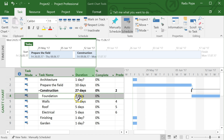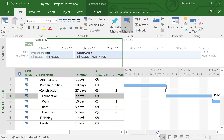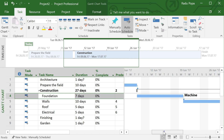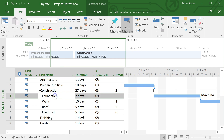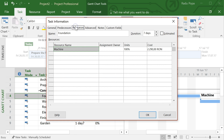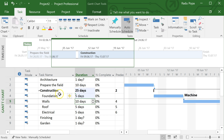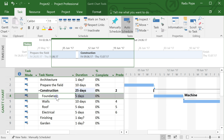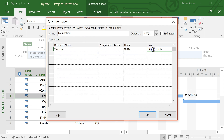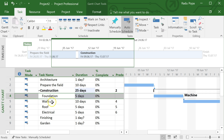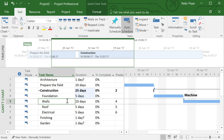Assigning the machine resource will calculate its cost over seven days — the duration of the foundation task. The good thing is that if the duration changes, say to five days, the cost will automatically be recalculated to account for the shorter duration. This is the way you assign resources to tasks.